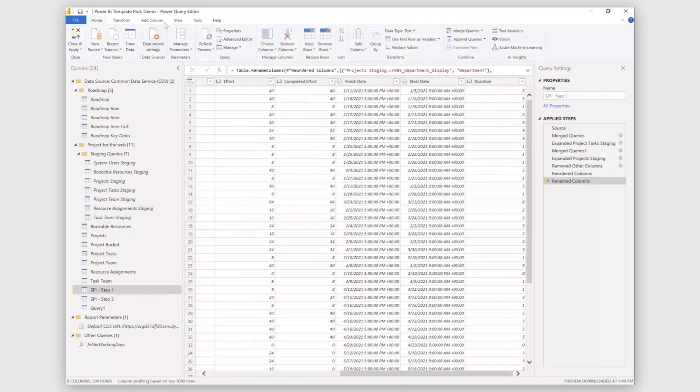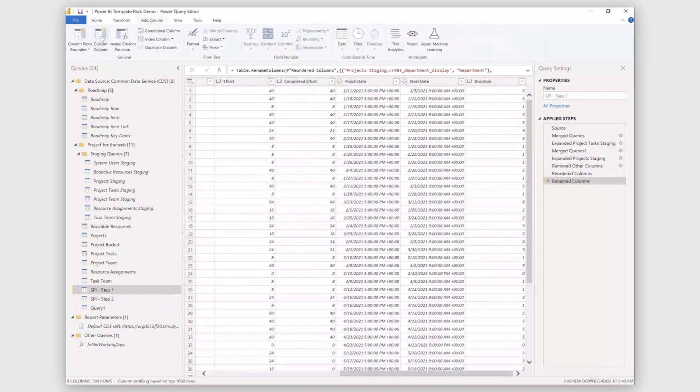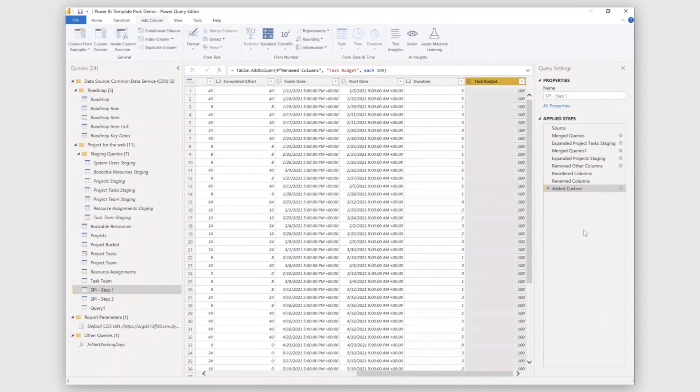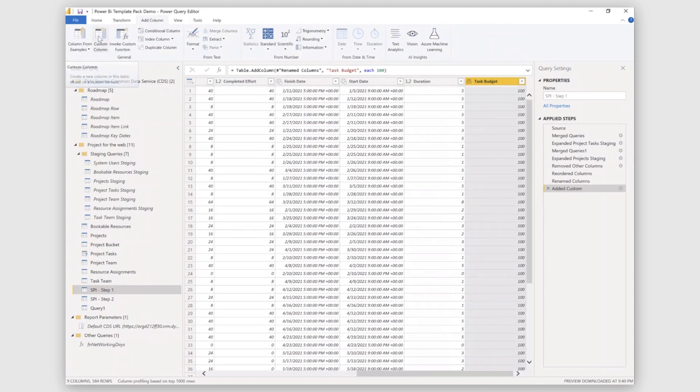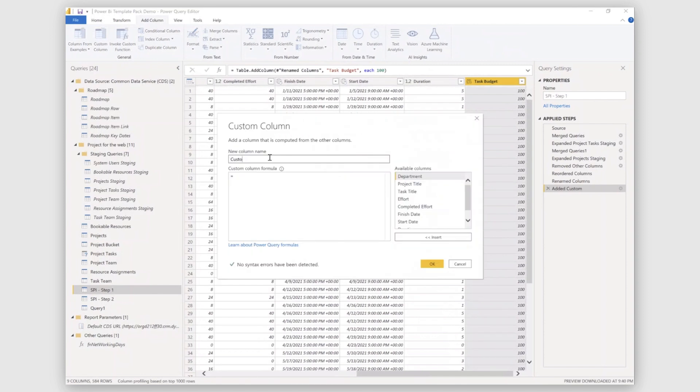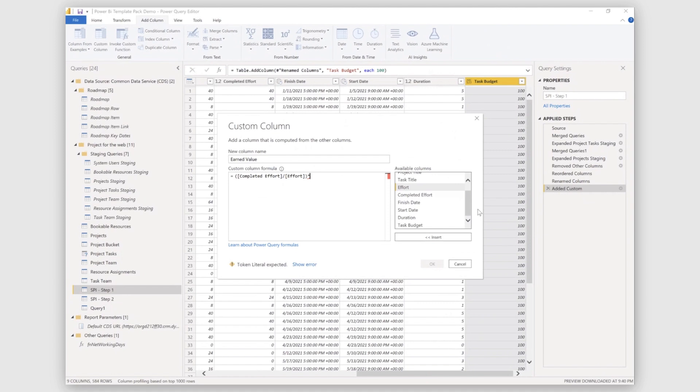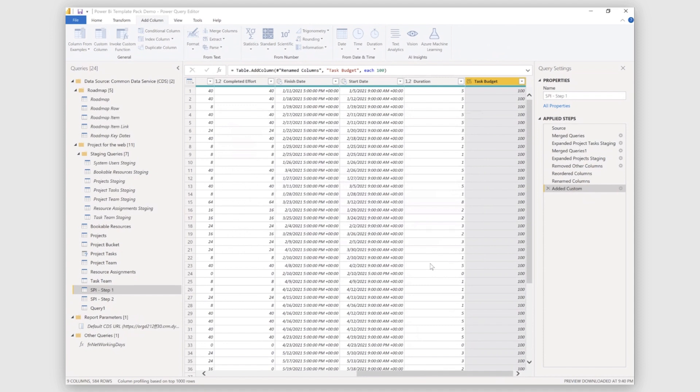Now I'll start my calculations over this. I'll go to add a new column. I'll add a custom column. And as I said, I'll take a constant value for task budget. Let's take a value of 100 here. Okay, now I'll be calculating my earned value. Similarly, you can follow the same step. As I told earlier, earned value is your completed effort over your total effort for a task.